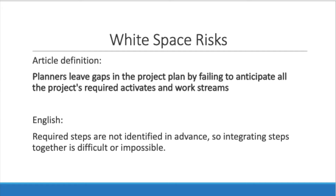The first topic discussed is white space risks. The article's definition is that planners leave gaps in the project plan by failing to anticipate all the project's required activities and work streams. In simpler terms, it means the required steps are not identified in advance, making it difficult or impossible to determine what steps are needed, where they're needed, and how long they're going to take.